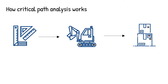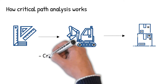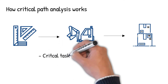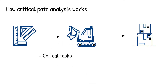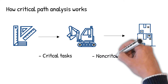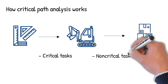In other words, some activities cannot physically start until others are finished. These are termed critical tasks, which inevitably present the risk of bottlenecks within a project program. The remaining tasks are generally termed non-critical tasks, and have what we call float.